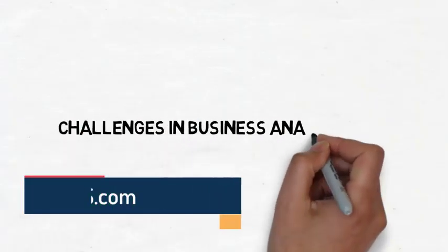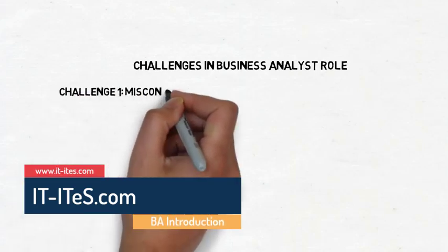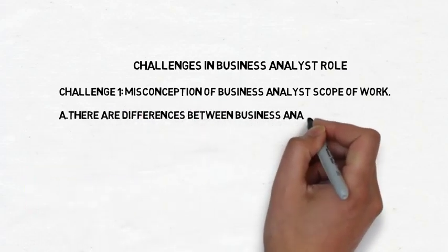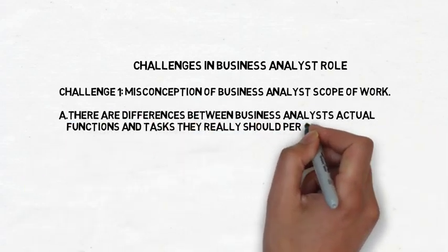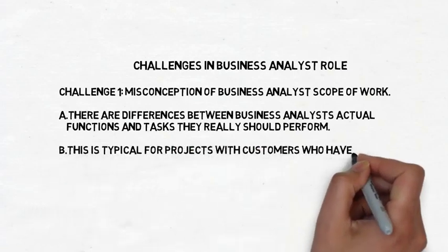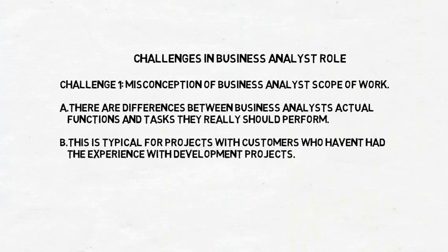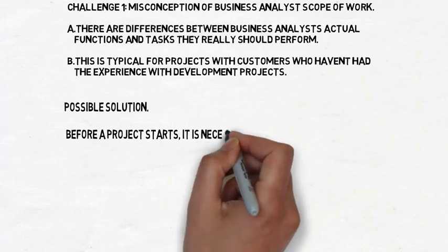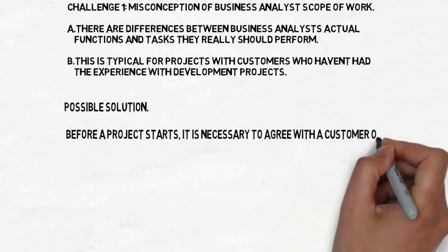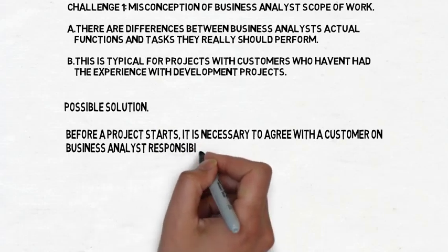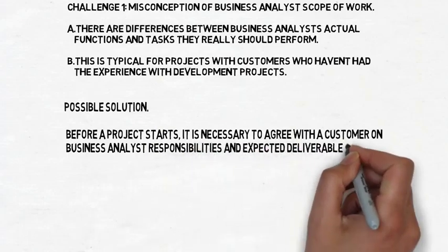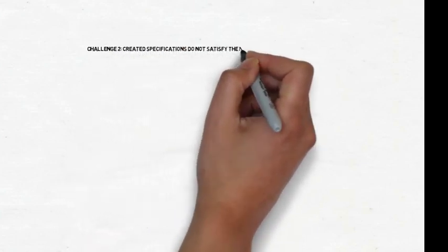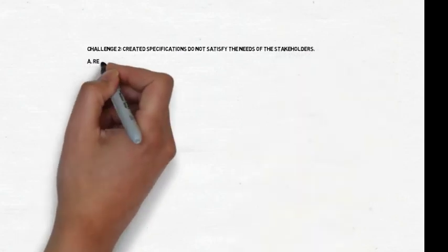Challenges in business analyst role. Challenge 1. Misconception of business analyst's scope of work. There are differences between business analysts' actual functions and tasks they really should perform. This is typical for projects with customers who haven't had the experience with development projects. Possible solution. Before a project starts, it is necessary to agree with the customer on business analyst responsibilities and expected deliverables. Challenge 2. Created specifications do not satisfy the needs of the development team.